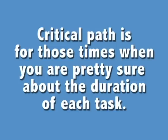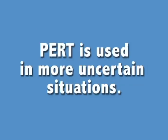Critical Path is more or less for when you're pretty sure about the durations — the time it's going to take to do each task or each activity — whereas PERT is used in a more uncertain situation. And you can use these three time estimates to come up with something called the expected time.